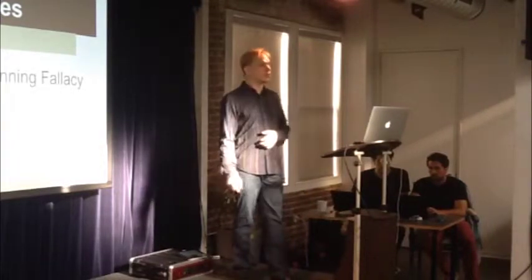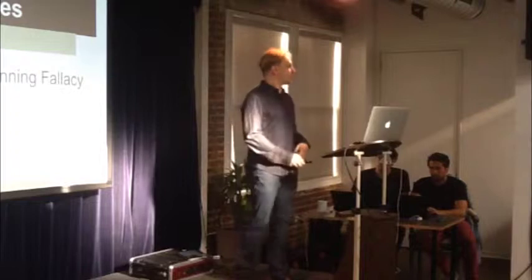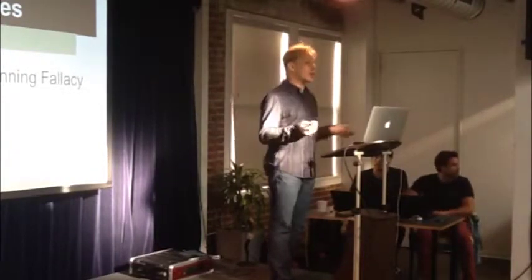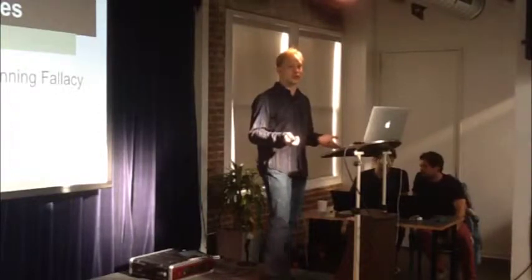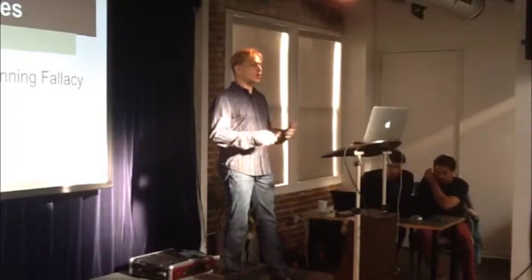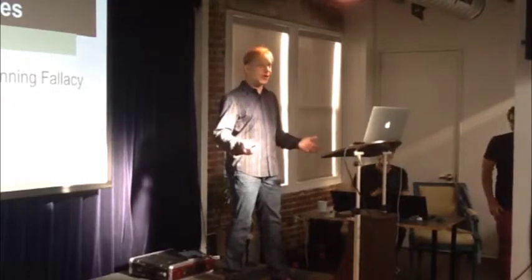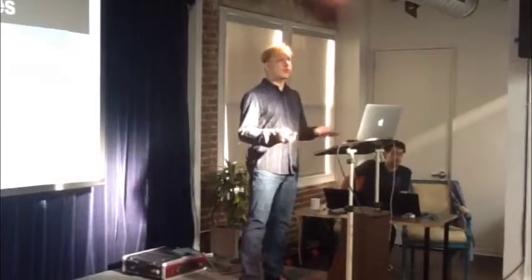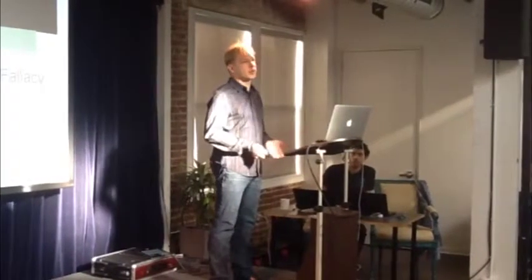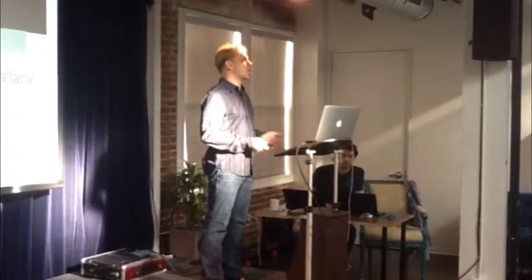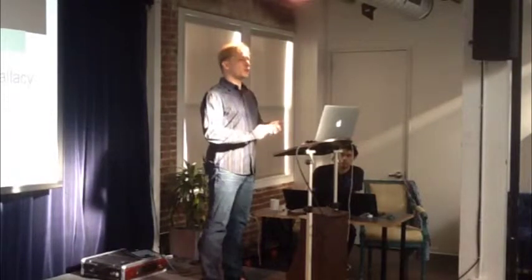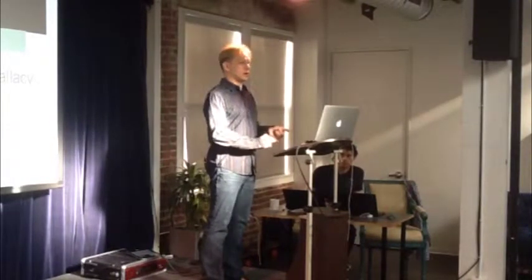The first one is optimism, pure and simple. You've probably heard the term the planning fallacy. If not, I suggest you go look at the Wikipedia page, start there and follow it to the research. The research has been going on for 40 years. It's very well established. It's kind of depressing, but it's important to know. The simple fact is humans are optimistic about their abilities to do things. Almost everybody underestimates how much time it's going to take. More importantly, even knowing that fact, people still underestimate.